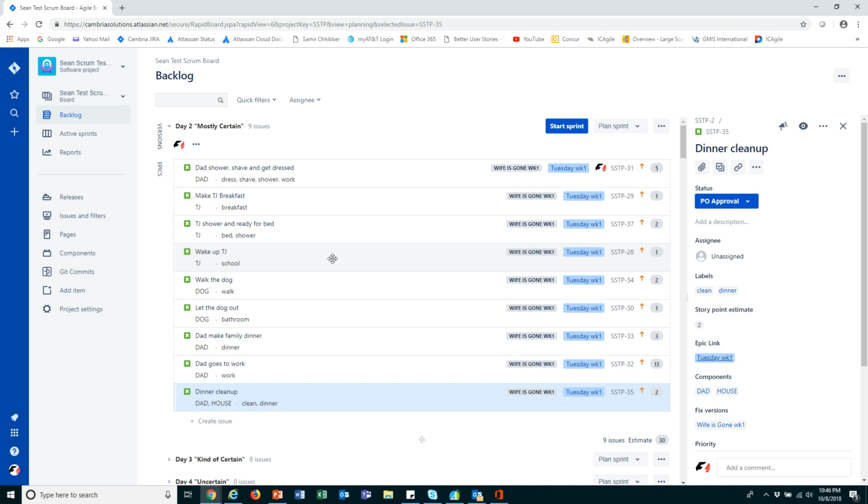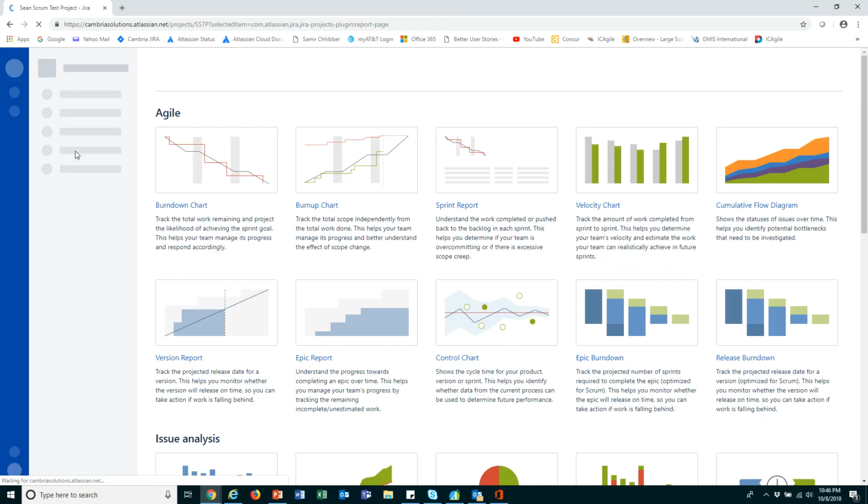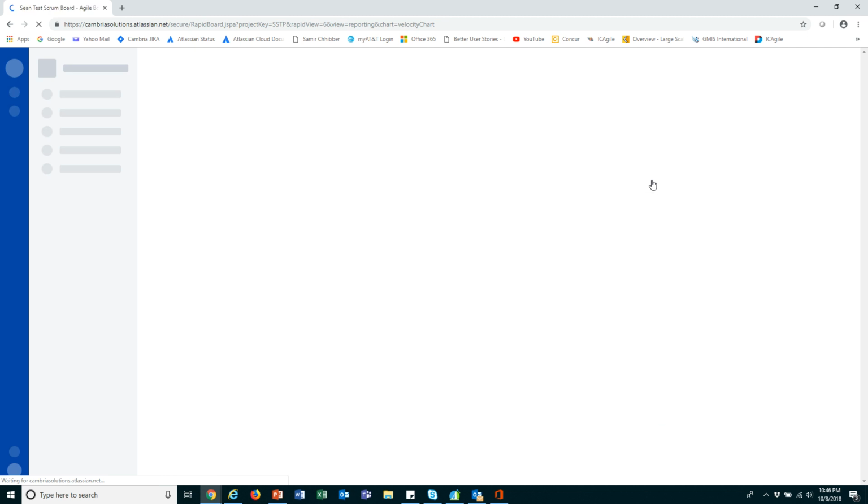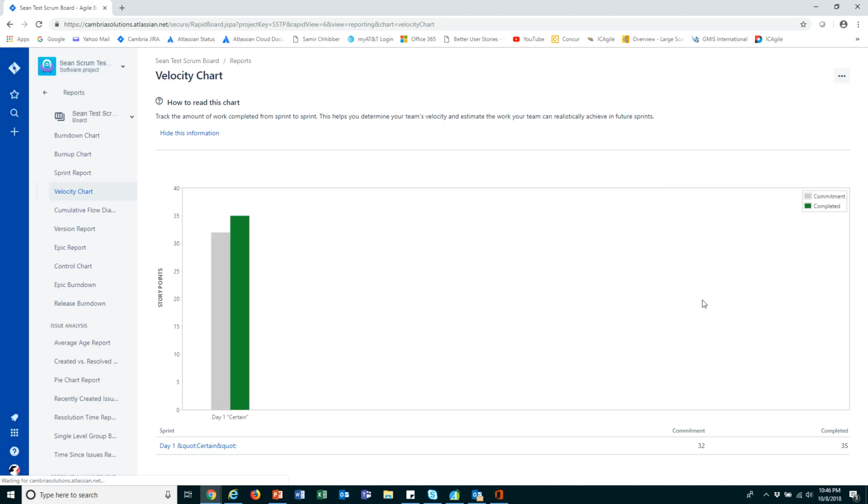All right. So before we launch our next sprint, a good Scrum Master is going to want to know certain pieces of information, and in particular, what the velocity of the team is. Now, generally, it takes about 3 sprints for the team to begin to develop a velocity. But in this case, we don't have 3 complete sprints. So we need to go off of what we do have, and that is we do have one completed sprint that we can look at.